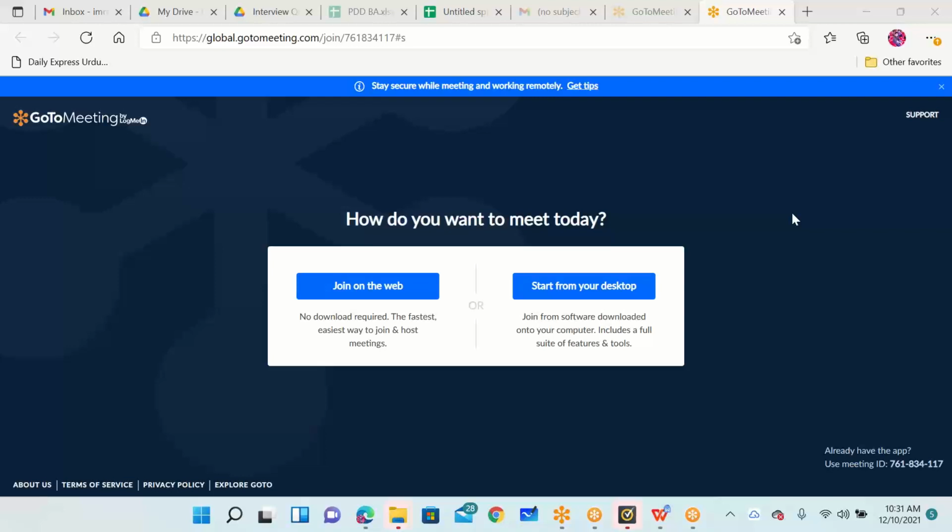Can you bring it? So that means now we have to create a change request ticket to map the new data and analyze it. First of all, we cannot approve it until we know that the data is for sure available in our database. And then we can work on the mapping part and tell them how much time it will take to do mapping, and then the coding team will tell them how much time it will need to do integration, and then the front end design team will tell them the time we need to build screens or new columns on the screens to show this data as well.